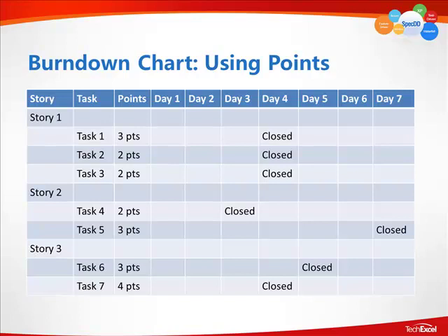For a team using points, what they do need to do is update it when that task has been completed. So you might have task 1 that's 3 points. Whenever those 3 points are completed is when the developer, the programmer, needs to update that. So it is very possible that during your burn down chart using points, you have a sudden drop in the line, in the slope downwards. So again, point based, simply how many points you start with directly to close.